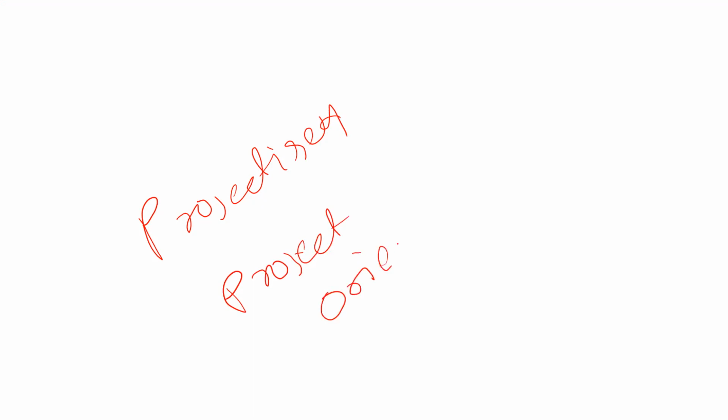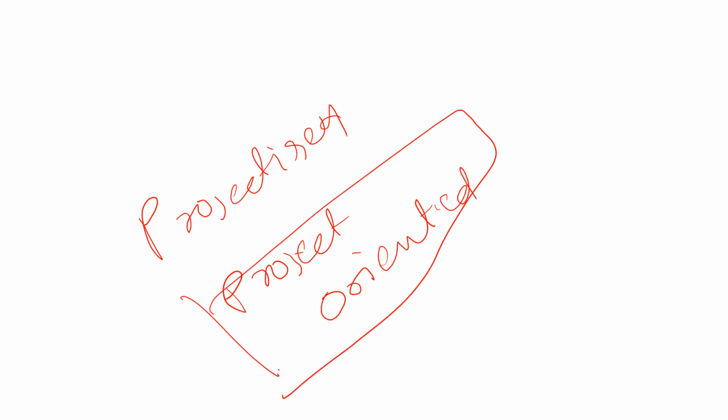Functional organization is the type of organization where resources are not directly under you. They are given to you. They have an external boss there. The second type is called the projectized organization, or sometimes project oriented. Now, in the project-oriented organization, friends, the people are directly under you. In this type of organization, they cannot be pulled, because without your permission he will not be able to do it.